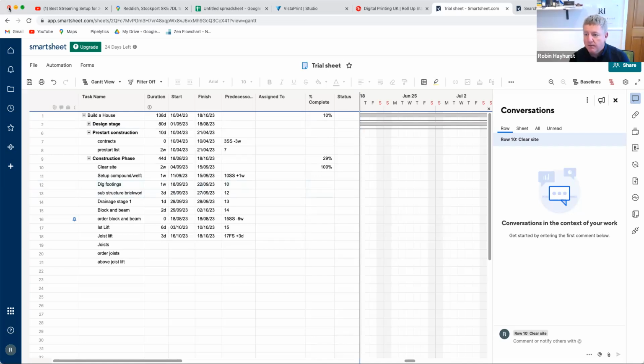So that's that one. Any other questions around Smartsheet? No, not at the moment. I will probably try. I'm going to start using it and see. Yeah, just try. I mean, if you've got this big project coming up, maybe it's worth doing that on Smartsheet. And if you do the contract program on Smartsheet without all the detail and just print off the contract program, then you can build the rest up around the contract program anyway. You can save the contract program so you've got a clean copy of it, and then you can create a new file and build the rest of the site out. Yeah.